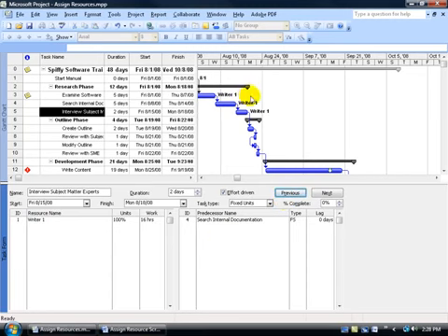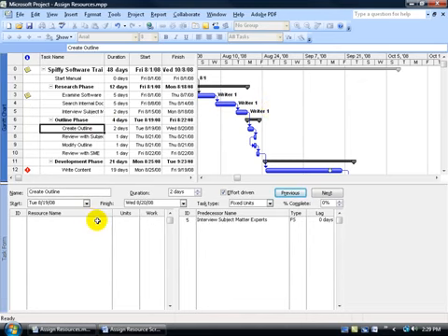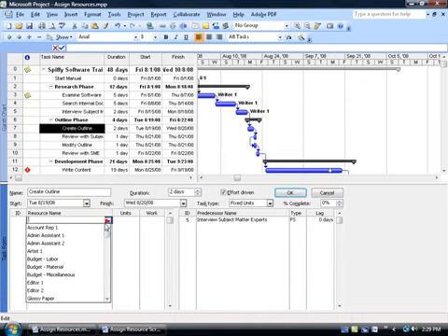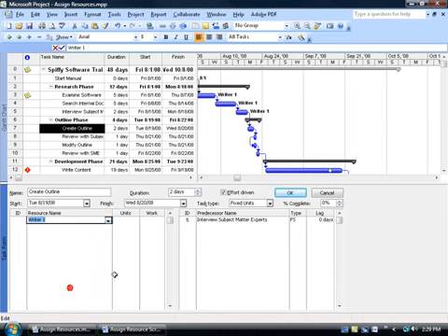And you can see over here in the Gantt chart that it's easy to spot our resources next to each bar. Let's go to task 7 and also assign Writer 1. Duration is 2 days from August 19th to the 20th. Click OK. And he's working 16 hours at 100%, 8 hours a day.